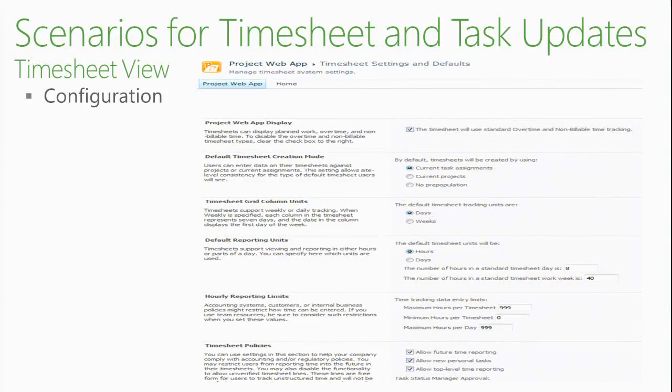Yes, you are right. That's why I thought the maximum hours per timesheet, maybe I could set that at a certain level, but no, that 8 hours per day is regardless. I cannot go beyond that. Here you would have the maximum number of hours per day. At the bottom, the limits, you could set the utmost maximum number of hours per day that users can report. If they try to exceed that, the system will tell them no, but what is the 8 giving me?